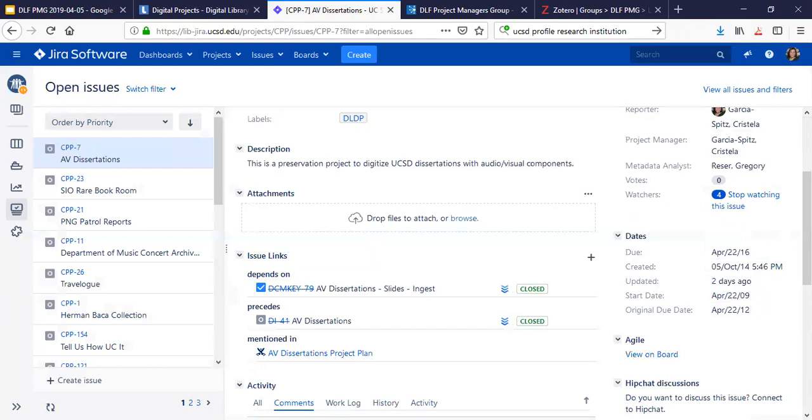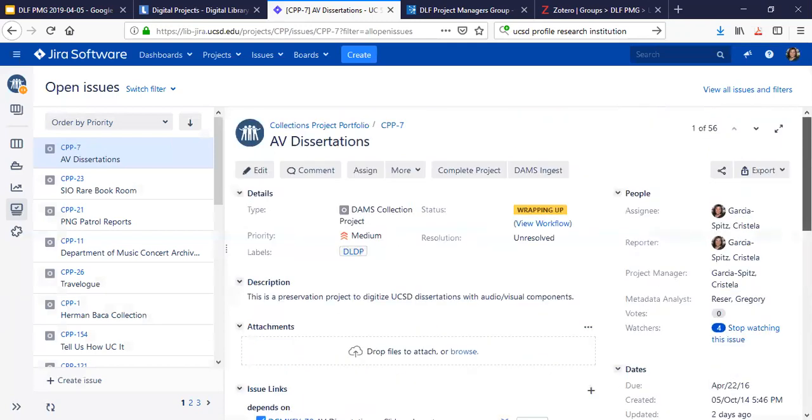You can see this was a really big project that changed quite a bit over the years. So it's nice to have the concept of when we originally started the project, and as the due date moves, keeping track of how far it moved. So we customized all this stuff to make these tickets.